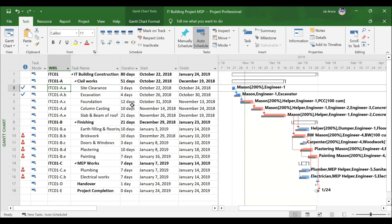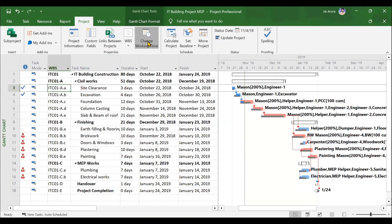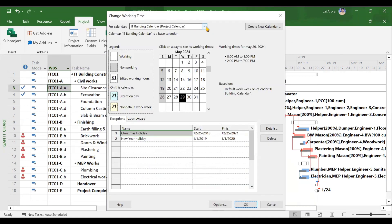After that, we will be creating something called WBS codes. WBS is nothing but a work breakdown structure. Every activity or work package should have a unique WBS code so that you can represent that particular activity or summary task using that code instead of writing the task name every time. After we are done with the WBS codes, we will be moving to creation of calendars. Every project site, depending on the location and country, has certain timings. Some sites start at 8 a.m. and finish at 7 p.m. with one hour break, and certain public holidays like Christmas or New Year may be observed.